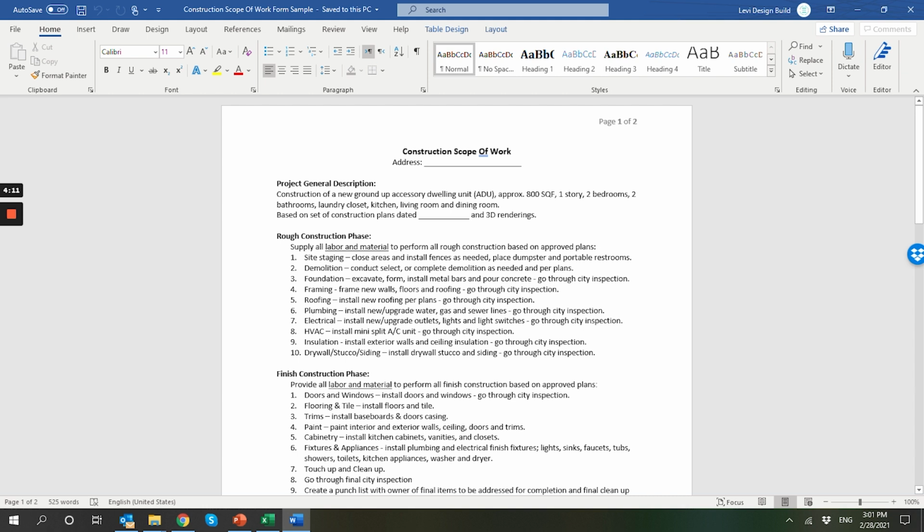And also, when you send it to the contractors, make sure that they're not going to remove anything from it, but they're going to add on top of it. I know that this will give you an apples to apples comparison between the different bids that you're going to get, and it's going to make your life easier when selecting a contractor before going into an actual agreement. That's it. Next one, we'll talk about qualifying contractors.